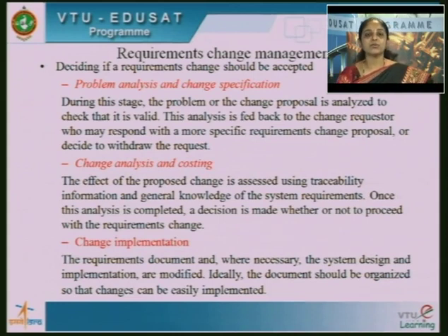Now, whether a certain requirements change has to be accepted or not depends on problem analysis, change analysis and change implementation. Okay. Problem analysis and change specification: during this phase, if you have identified a problem with the existing system and you want a change in the requirement, or when there is a proposal to change the actual requirements of the system, it is going to be checked whether it is valid or not. That is the first activity.